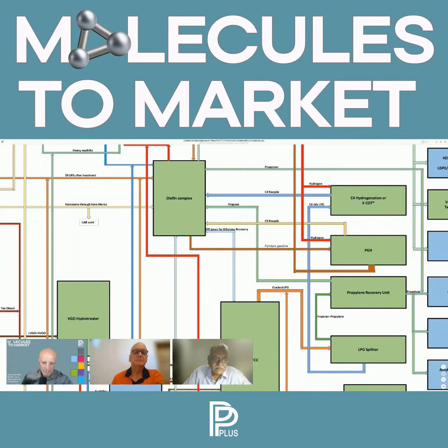So in India, there is a third route, which is also a very popular route, which you call, in your parlance, open book estimate. An open book estimate is very popular in India in the hydrocarbon industry also. But the way we implement it, at some other point we can discuss that. So far the arrangement has been only between public sector undertakings. We have not seen an open book estimate being implemented by a private company as happens in the West. But open book estimate is a good marriage between EPCM and EPC.